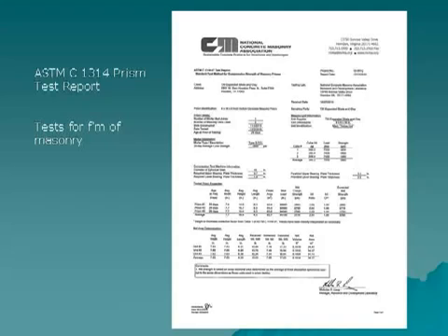Prisms can be pre-tested by the block supplier and the report can become part of the submittal package. Or, prisms can be tested during construction to provide quality control checks as outlined in ASTM C 140.